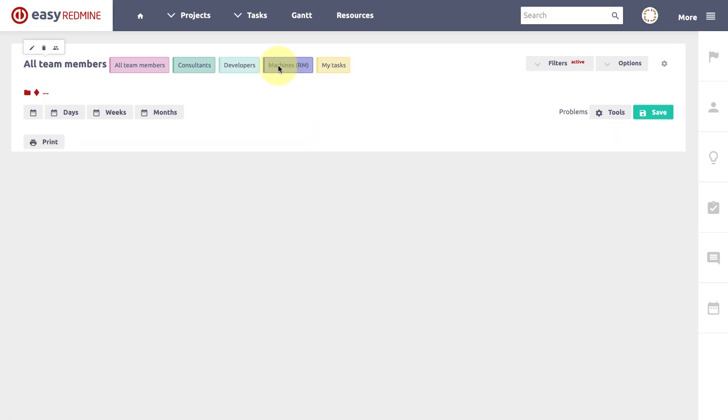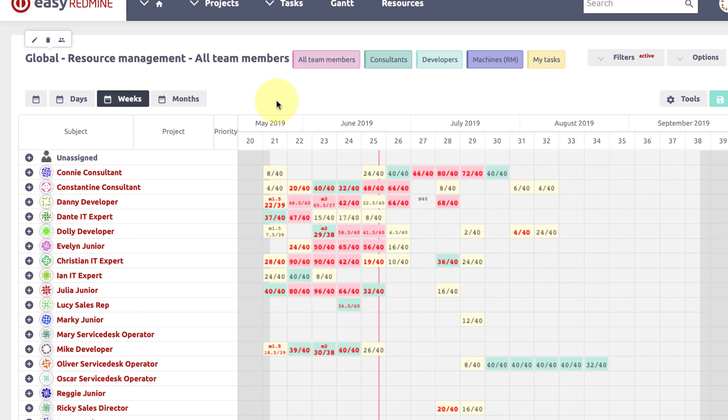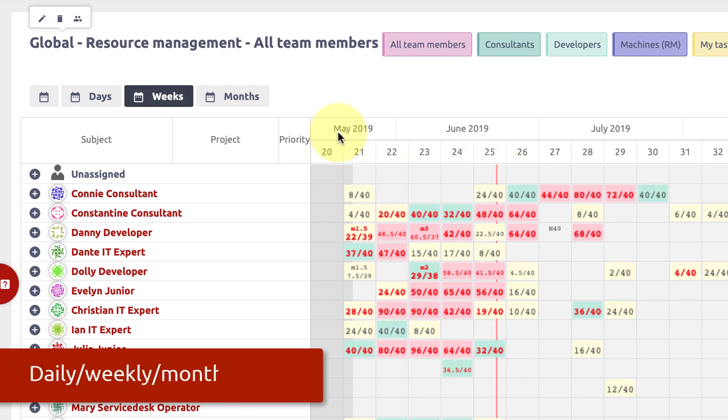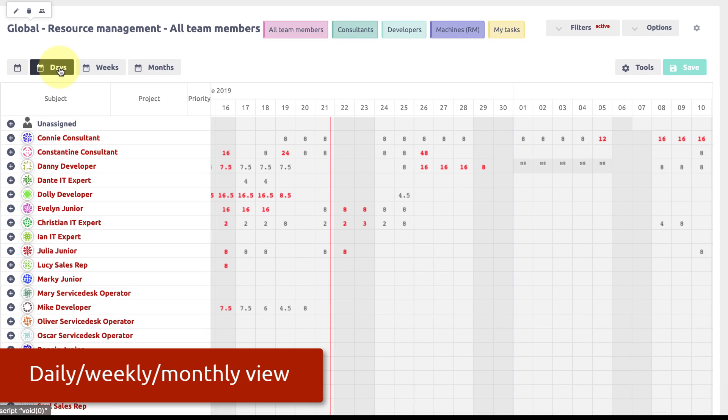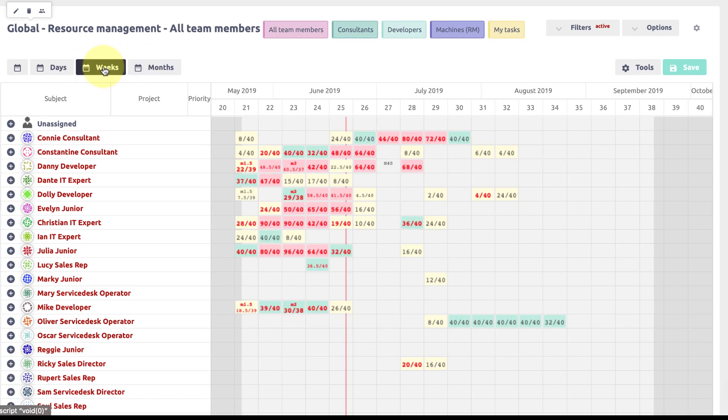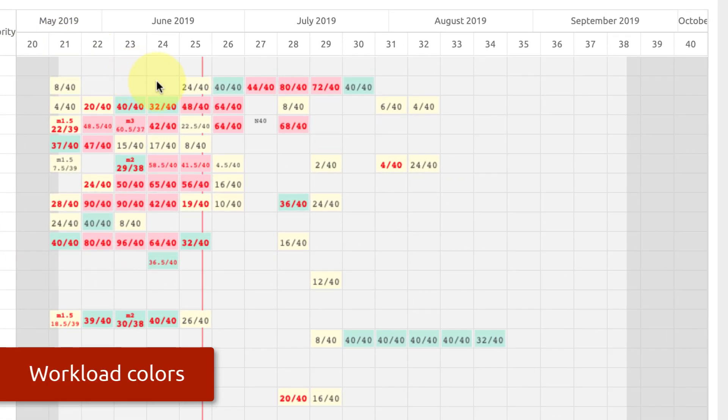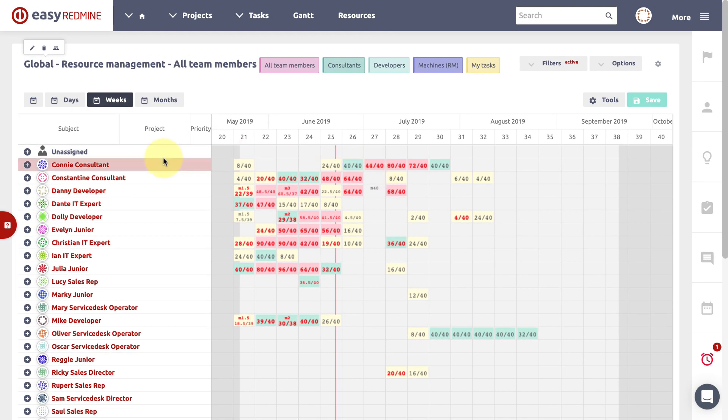In the chart each square represents a week as well as different viewing modes for daily or monthly view which are available here at the top. Colors indicate the workload of a particular user in that week. Green indicates an optimal level, yellow indicates the availability of free time and red indicates overload.